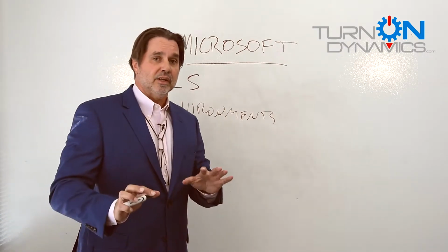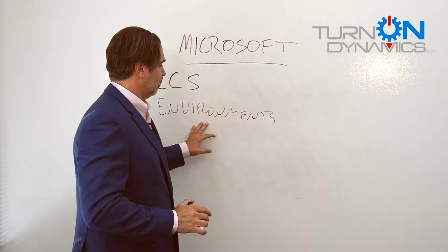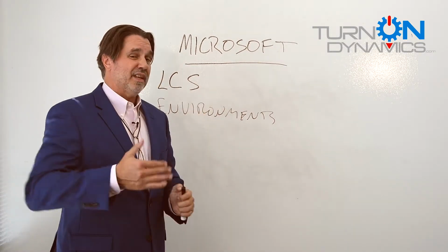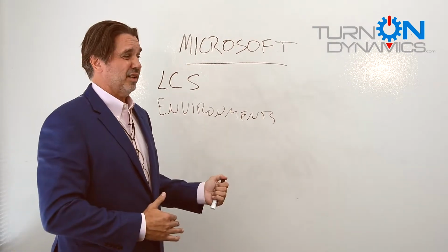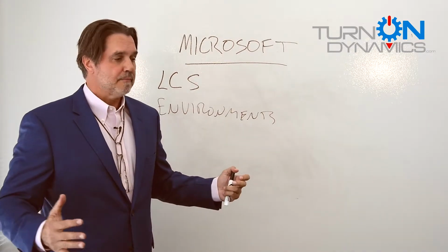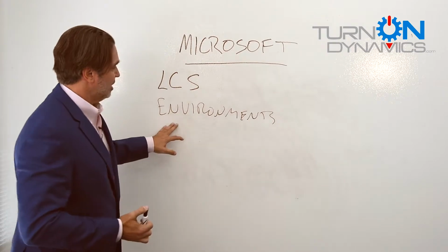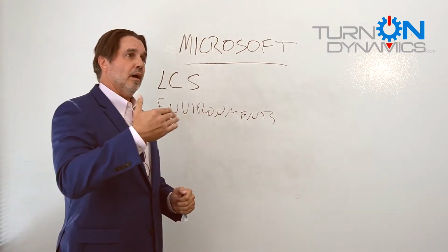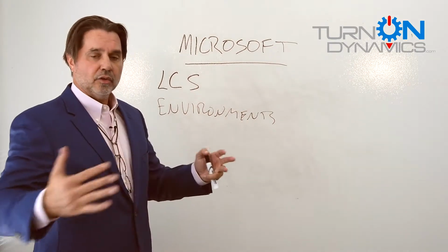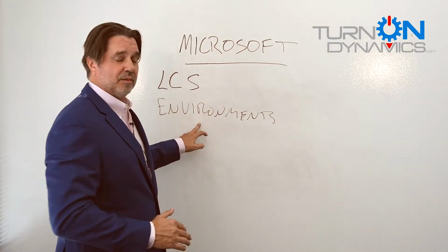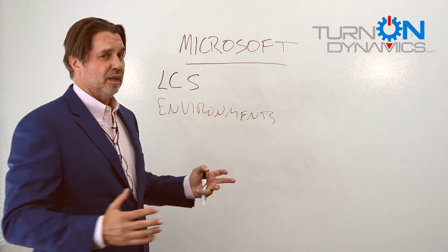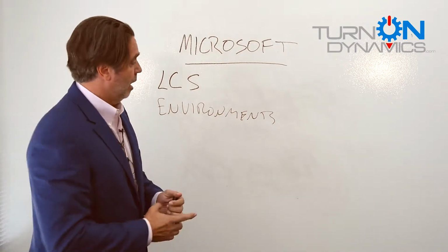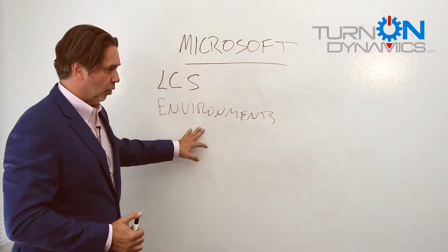It is our experience in the real world that oftentimes with these environments and how they're processed by Microsoft, what they tell you how long it's going to take and how long it actually happens can differ dramatically. So if you don't understand this topic, if you don't understand that potential lapse, you may be planning a project with a certain duration and a certain amount of time to do certain tasks regarding environments within that project, and you completely blow that project plan because you're no longer in control.